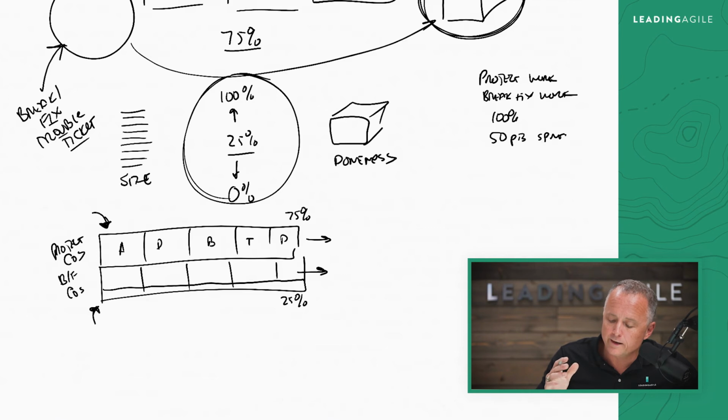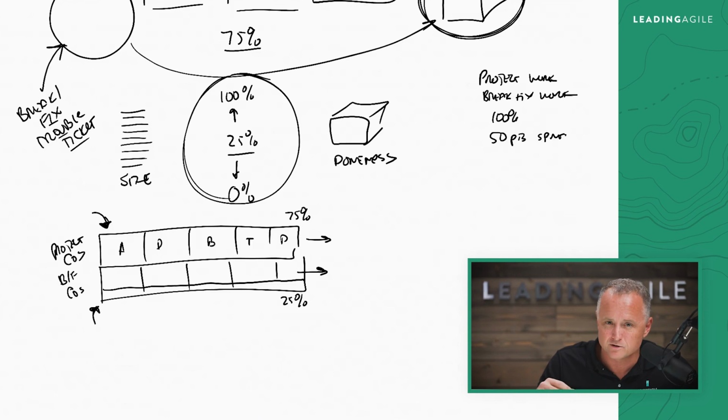So it's an interesting thing, right? This interplay between how you design metrics, and then, again, you can just game it. If it's just to stabilize velocity, I can make my velocity stable. I've had teams try to put meeting time in their velocity, because they have unpredictable meetings, so that they stabilize their velocity. I've literally had people want to put lunch hours and things like that, do all kinds of crazy things to stabilize their velocity.